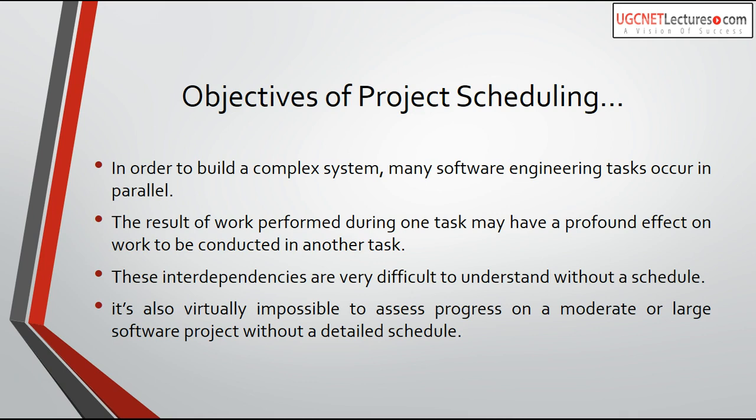Design and coding activities can also go in parallel. For example, if you divide a software into parts, you can design one part and after completing its design, begin coding it. While coding the first component, the designer can simultaneously design the second module. When the second module's design is complete, the coder can start coding it. Like this, activities can proceed in a pipeline fashion — but you cannot start the coding phase before finishing the design phase entirely.